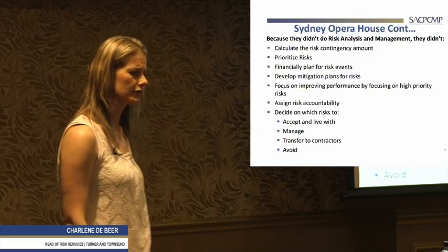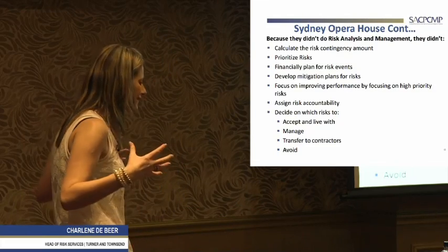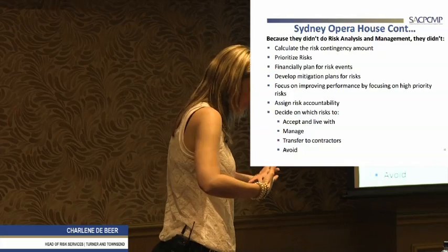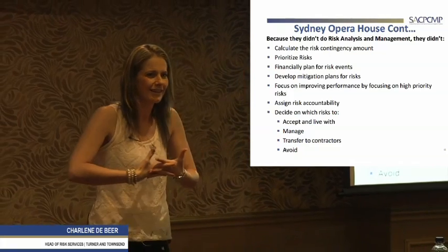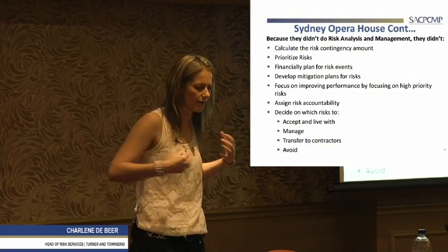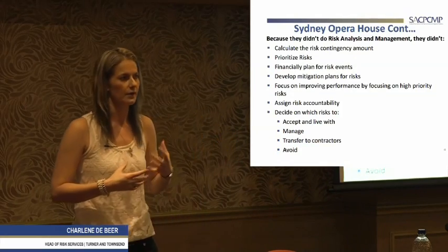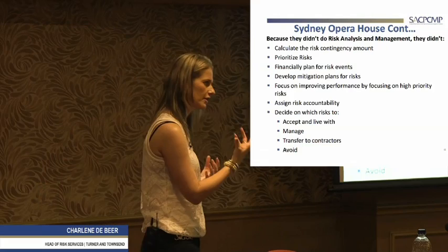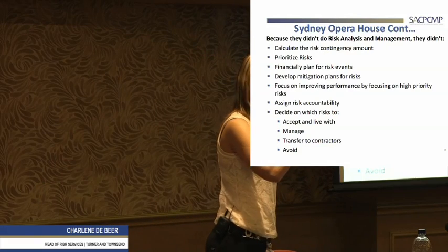That's why we have integration schedules as well. Because usually where the integration is, that's where the risk comes in. It might be two contractors, it might be two disciplines needing access from the other one, and that's where the risk starts happening. So it's an integration session you have with all these disciplines on site.